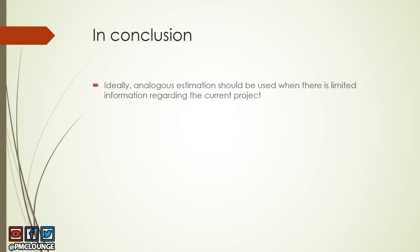In conclusion, you should ideally use analogous estimation only in the starting stages of your project — only in the beginning, in the initial phases, when you have very limited information. If you have detailed information, go with other tools and techniques of estimation which will give you more accurate and reliable data.